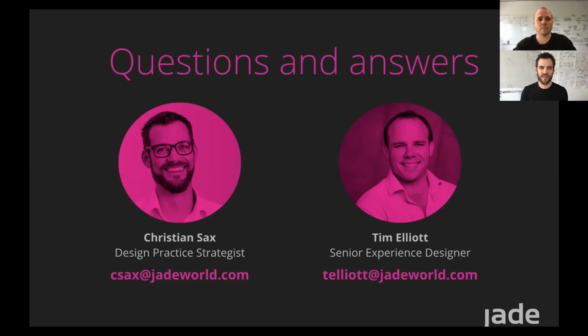There's another question here about recruiting test participants and whether you need a design sprint master, like a scrum master, to facilitate the process. First, on test participants, it's really crucial to have them, because if you don't have 5 people showing up on the Friday, you haven't completed the design sprint and you won't get the answers. So depending on the client's situation, we investigate quite early whether they have their own network to recruit users or customers. If they can, that's usually one way to go.